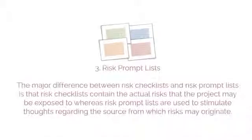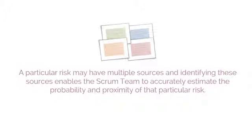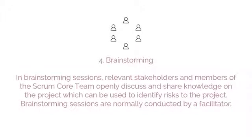The third technique is Risk Prompt Lists. The major difference between Risk Checklists and Risk Prompt Lists is that Risk Checklists contain the actual risks the project may be exposed to, whereas Risk Prompt Lists are used to stimulate thoughts regarding the sources from which risks may originate. A particular risk may have multiple sources, and identifying these sources enables the Scrum team to accurately estimate the probability and proximity of that risk. The fourth technique is brainstorming. In brainstorming sessions, relevant stakeholders and members of the Scrum core team openly discuss and share knowledge on the project, which can be used to identify risks. Brainstorming sessions are normally conducted by a facilitator.